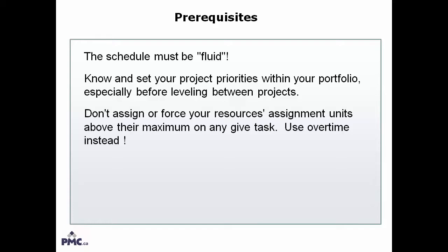Another important thing is, don't assign or force your resource assignment units above their maximum on any given task. Apply overtime should be used instead. If not, leveling will not work. I see this bad habit more often than not.